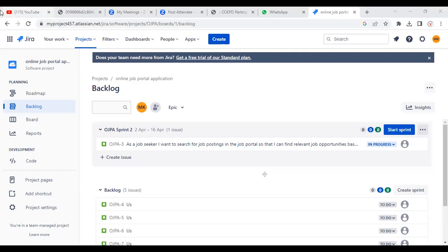Okay, Sai. Ma'am, I have one question. How can we split the user story? Is there any button or something like that to split? You split the user story in the product backlog, Ankita. You don't split the user story once it is in the sprint. So before it comes to the sprint, if you want to divide it, please do that in the product backlog, and then accordingly you'll prepare the sprints.